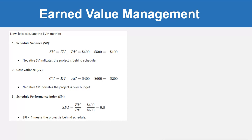Schedule Variance: SV = EV minus PV = 400 minus 500 = minus 100. A negative SV indicates the project is behind schedule. Cost Variance: CV = EV minus AC = 400 minus 600 = minus 200. A negative CV indicates the project is over budget.